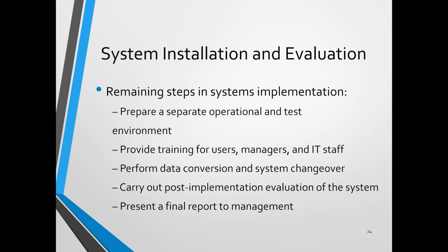In the last 6 months you may start converting the data from 2010 to 2019, and after the system is finished this month, November, you can start converting the data in 2020 until now.